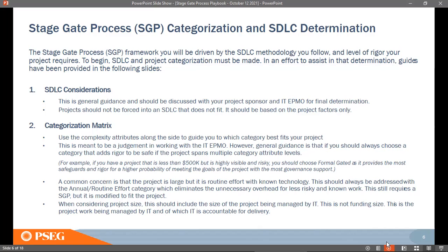Depending on the criteria that you evaluate as a project team, you have the flexibility to come up with a customization, a tailoring matrix for yourself. The SGP tailoring matrix will help you understand, based on your project and those parameters, what needs to be taken in and what can be categorized as not applicable or not useful for the way you want to implement the project.